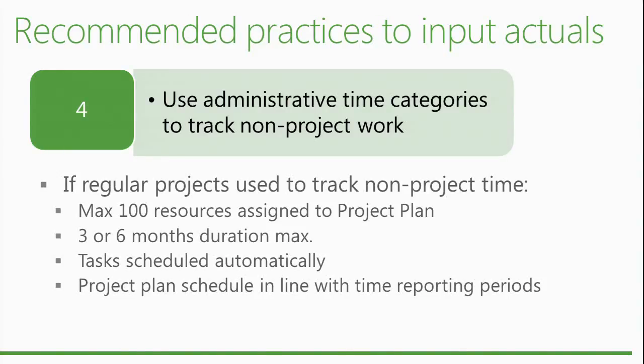And this is for the sake of performance. You should try to not assign more than 100 resources to the project plan. I'm sure some of you have experience when you assign many resources to a project plan, and also many resources to a task, that you can see an impact on the performance. So this has to do with that, and combined with a very long duration, for example, of the tasks, you have the recipe for poor performance on a project when you do that type of thing. So the recommendation is to keep to a limited number of resources.